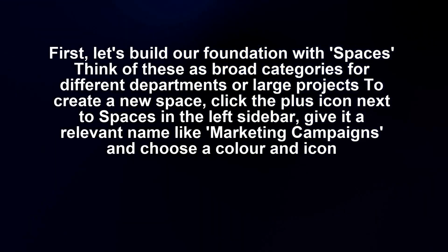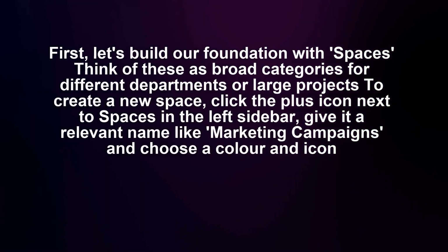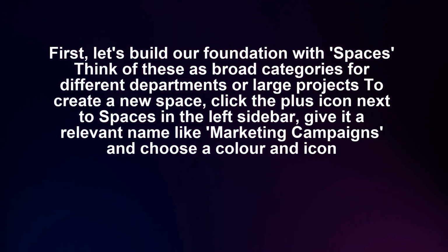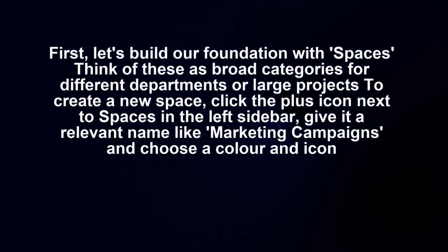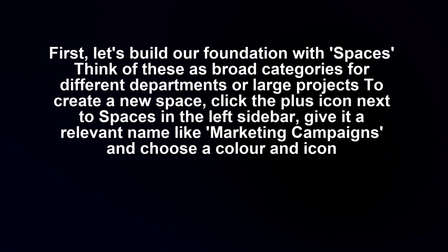First, let's build our foundation with spaces. Think of these as broad categories for different departments or large projects. To create a new space, click the plus icon next to spaces in the left sidebar. Give it a relevant name like marketing campaigns and choose a color and icon.